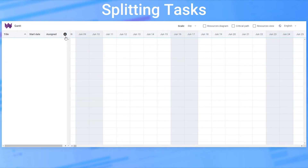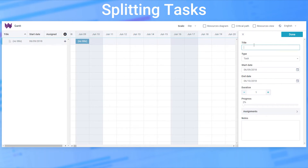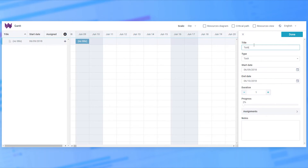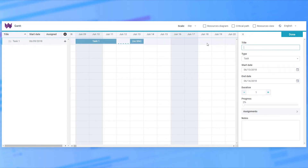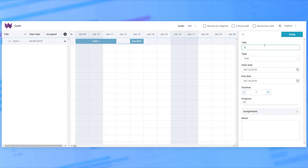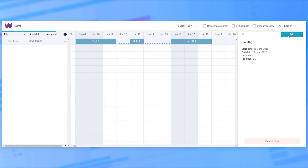Besides linking between different tasks, you can also create related sub-tasks within a specific task. The parts of such split tasks are displayed in one row and connected to each other by a dotted line. Unlike the basic tasks, the sub-tasks of the split ones are not displayed in the tree and cannot include child items.